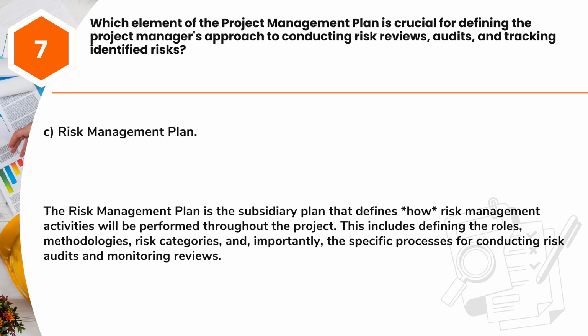Answer: C. Risk management plan. The risk management plan is the subsidiary plan that defines how risk management activities will be performed throughout the project. This includes defining the roles, methodologies, risk categories, and, importantly, the specific processes for conducting risk audits and monitoring reviews.